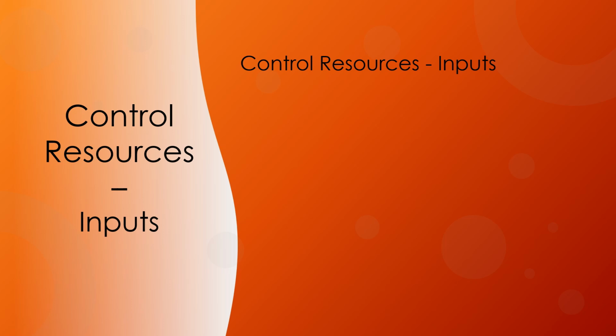Control resources is the process of ensuring that the physical resources assigned and allocated to the project are available as planned, as well as monitoring the planned versus actual utilization of resources and taking corrective action as necessary. The key benefit of this process is ensuring that the assigned resources are available to the project at the right time and in the right place and are released when no longer needed. This process is performed throughout the project. The control resources process should be performed continuously in all project phases and throughout the project life cycle.